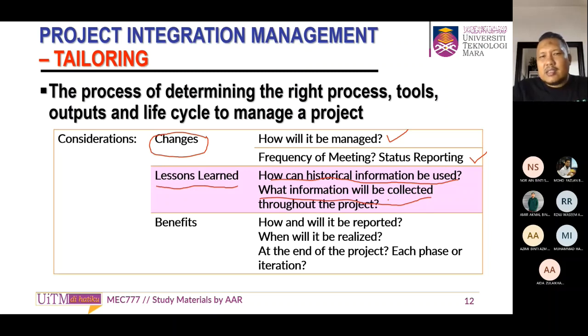The first lesson learned is related to the room data sheets. When any new project is running, the room data sheet is one of the things that I, as a client, always hold and use as evidence if any disputes come after that.